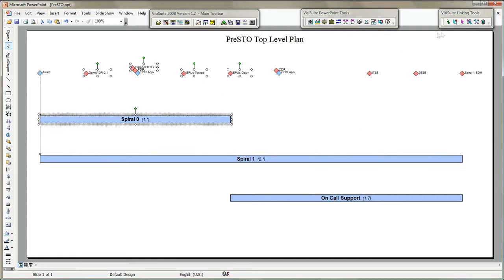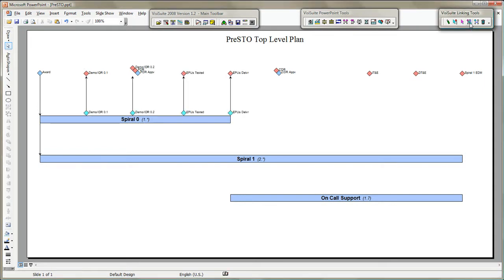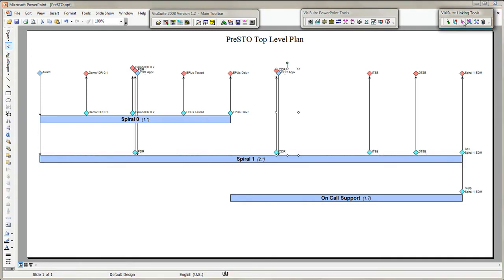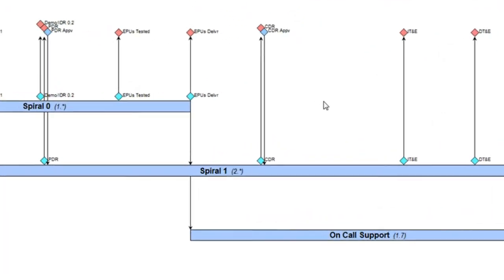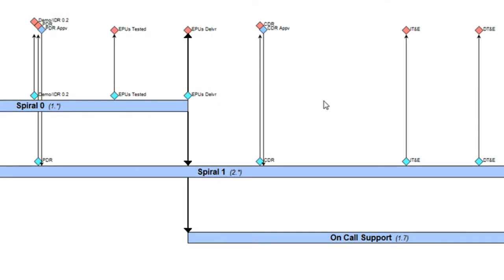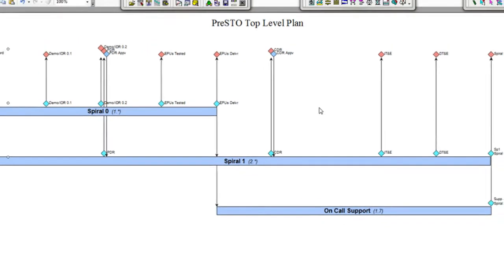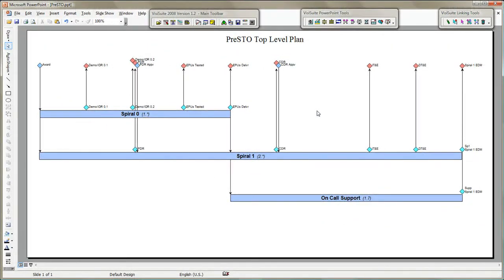I also use a copy tool to create the necessary accomplishments for each effort that will produce the corresponding events. There are also accomplishments that are critical handoffs between work efforts. Constraints that hold up work efforts are represented by lines and arrowheads. An important takeaway is that these pictures depict the agreements reached between team members during work group planning sessions.